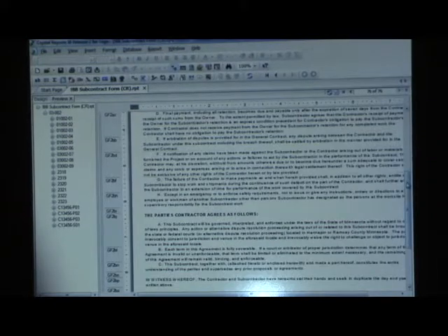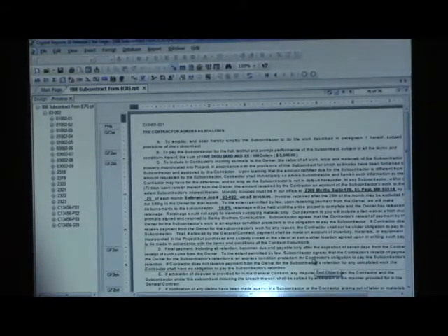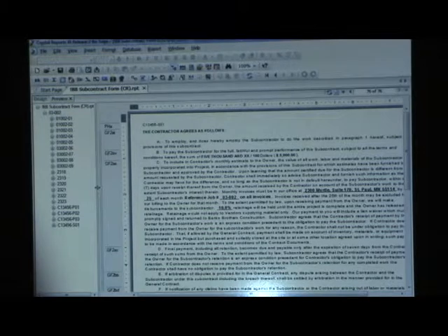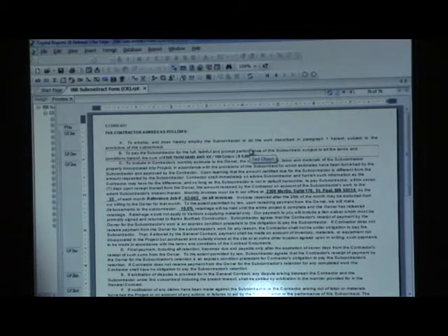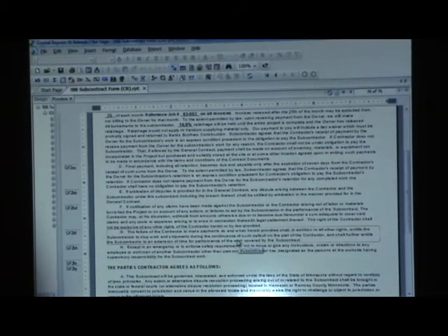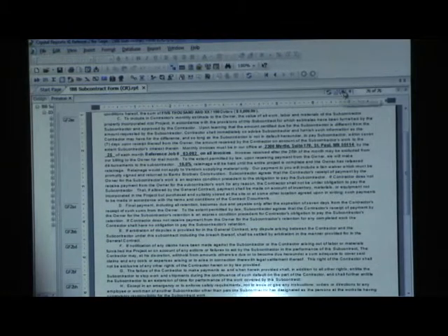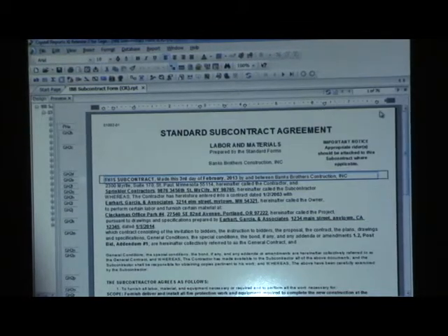And then if you're tracking start and end dates, a lot of companies don't put that in the subcontract since it's often subject to change. You don't know when you want the sub to show up until after they've signed the subcontract. You know, and then it's a couple pages of requirements, and then it's how much are we going to pay you? Where do you invoice to us? Sign here.